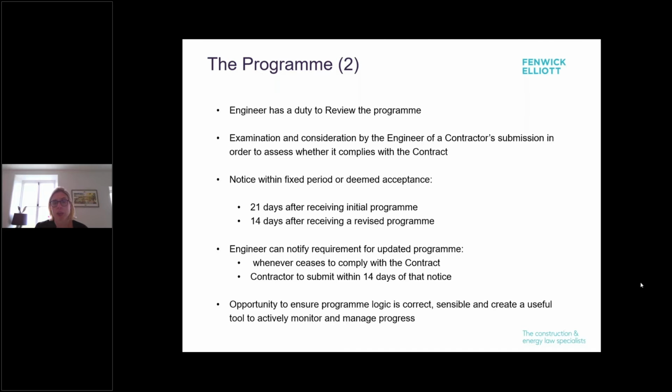I mean, generally speaking, when we see disputes at the end of the line, if there's a poor programme or it hasn't been handed over or updated properly, the logic links don't work, the review periods would never have quite worked, they're not realistic, it all either causes disputes in the first place or adds to the expense of dealing with them. So the engineer has to look at it and he has to give notices within a fixed period if he doesn't agree with it or has any comments or it's deemed to be accepted.